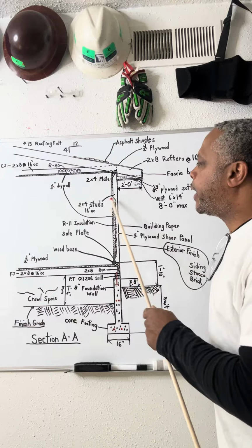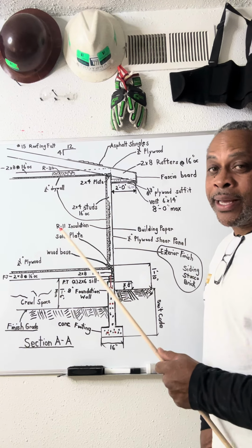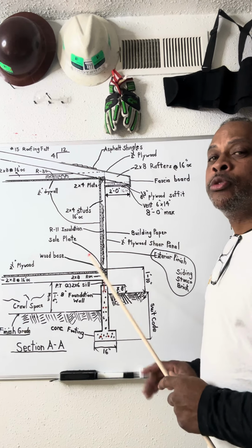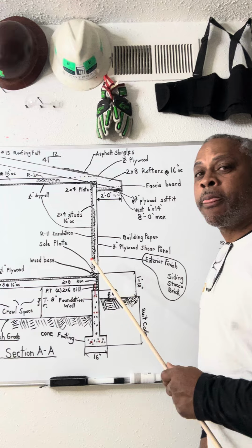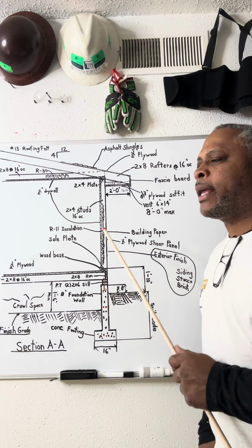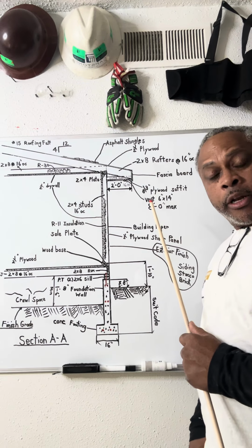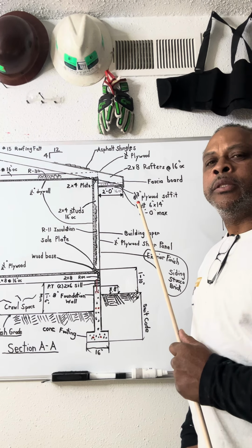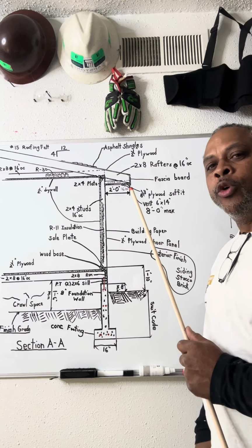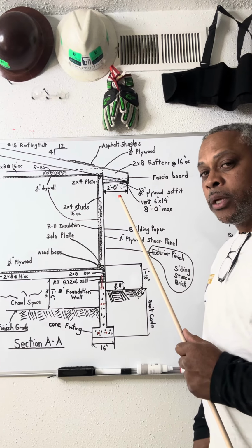You have a stud. This is the 2x4 member. Or don't forget, it could be a 2x6. It is going to specify everything that you see here on the sectional drawing or view. If you see anything else on here that's different from another part of the plan, this is what you do. You take the note, you call the architect or the engineer that's on the site, okay?